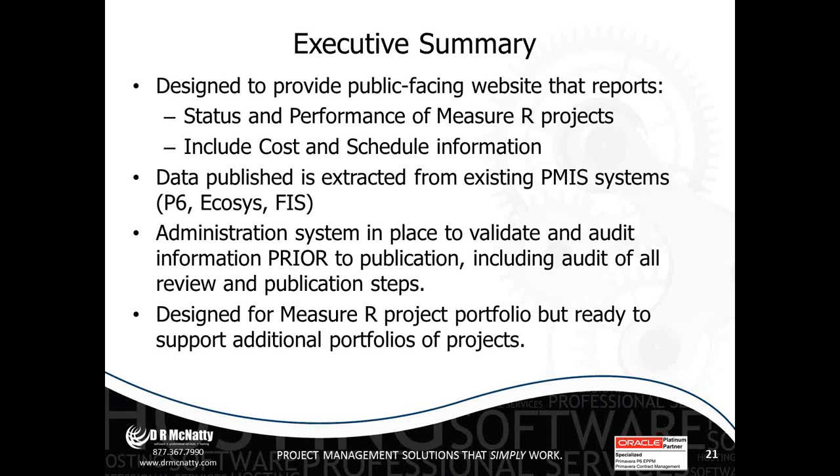An important part of this is an administration system that's put in place to validate and audit information prior to publication. We don't want the information on the public website just to be pulling automatically from the PMIS system unless we've had a chance to look at it and make sure this has been validated, this is up to date, because this information is updated daily. So we don't want to take a chance on anything slipping through that hasn't been audited and approved before publication. So that is definitely a part of it.